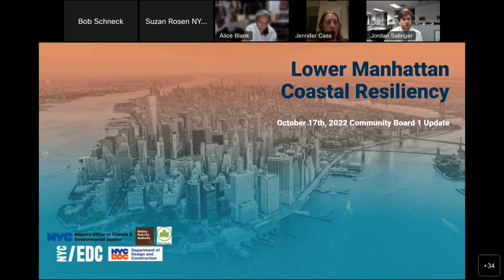Jordan, can you just tell us where the pump station is? Is it yet identified in a plan, in a general location, or not yet? The two locations that were identified in the master plan were the Coast Guard site, and as part of the extension north of the Battery Maritime building. I believe there were a couple variations around there, but once again, this would be on new extended land in that area. And so this is work that we're embarking on with DEP over the next couple of years to better understand viability of those locations, and sizing, and ability to function in different storm events.